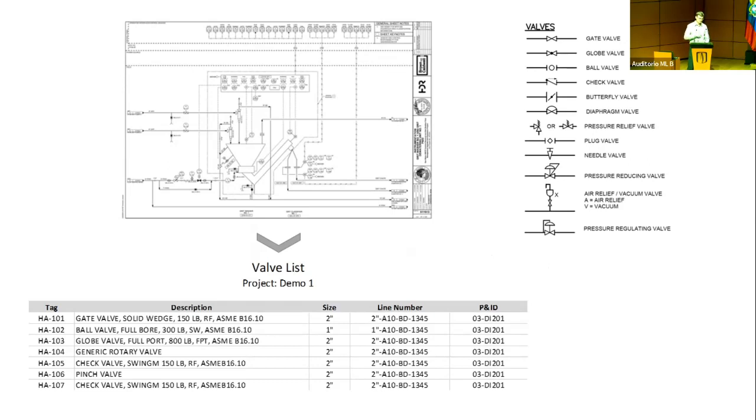And at the beginning of a project, a person now needs to go through this booklet, identify all of the valve symbols, transfer all of those valves into a spreadsheet so that you can then go and order all of this equipment. The longer this takeoff takes, the more delayed the actual order of the equipment becomes. And if there is a long lead item, that can cause problems.